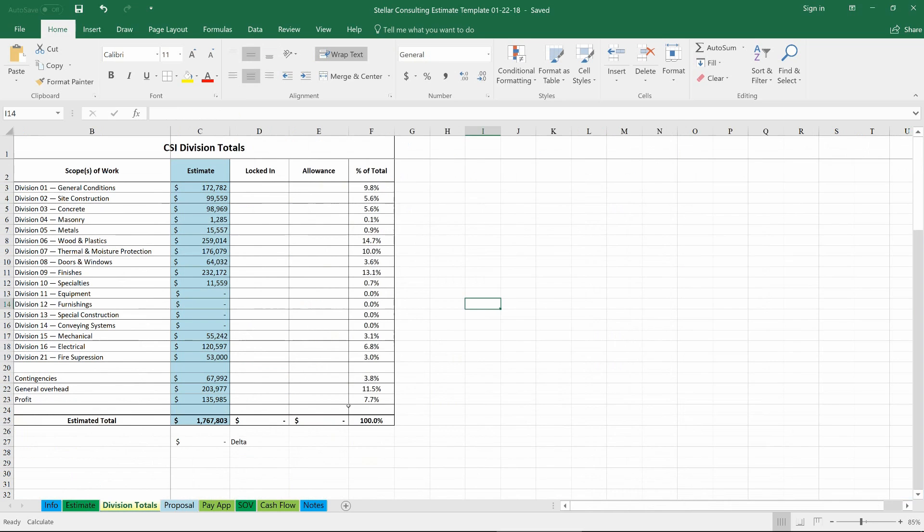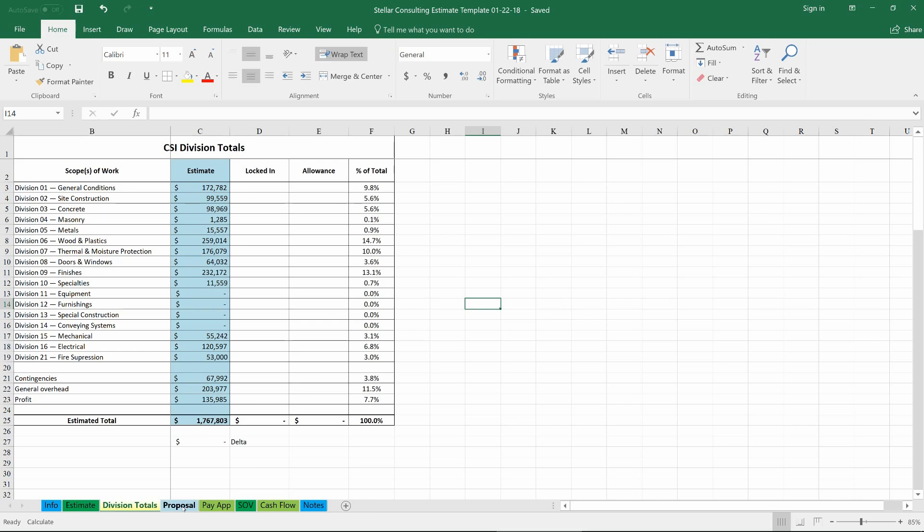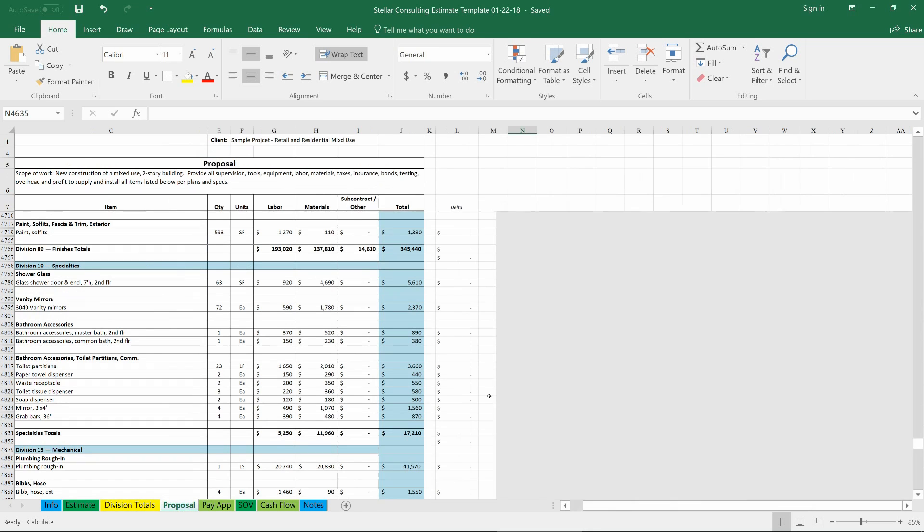We've got a divisions total tab, just breaks things down by straight division, and if you were bidding this you could go through and fill in what items were locked in as bids, subcontract and supplier bids came in, for example.